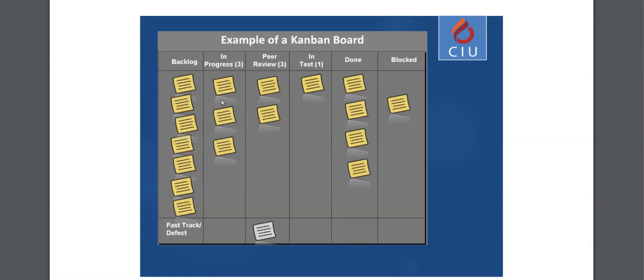People, such as your management, can see that you're already busy with 3 tasks, and before dumping more tasks on you, they will actually look at the Kanban board that you prepare and say, okay, now Ahmed, for example, is working on the 3 tasks from the board that was given to him this week, so I'm not going to give this job to him. I'm going to give it to, let's say, Fatih, who has less progress, fewer tasks on the Kanban board. So every person has this.